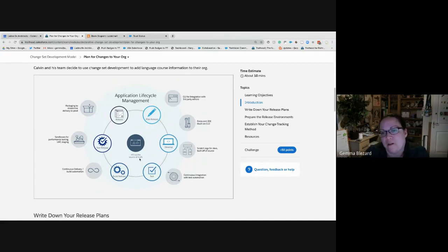With something living and breathing like Salesforce, it becomes even more important to have a lifecycle management strategy. As I said, for governance, make sure that nothing gets out, so that your org doesn't get out of control. For minimizing the impact of changes. If you suddenly change a workflow rule while the users are in the system at 2 o'clock in the afternoon, and all of a sudden something that they were able to do 2 minutes ago suddenly doesn't work anymore, that really can destroy the trust that your users have in the system and ultimately destroys adoption. So that's another huge risk.